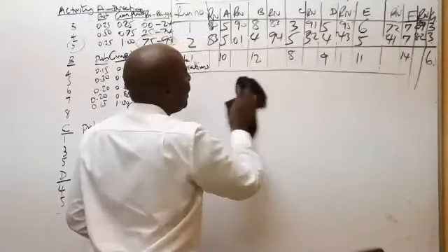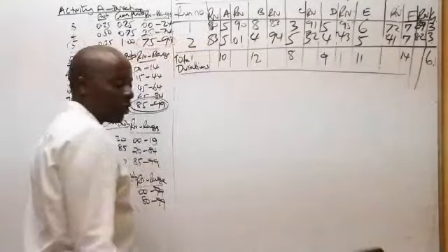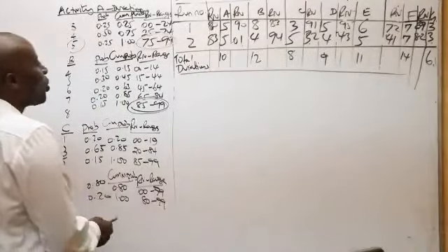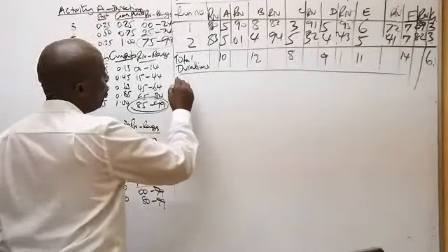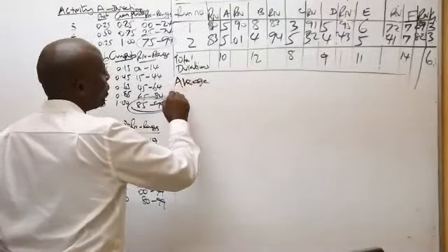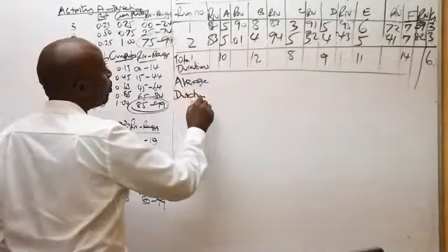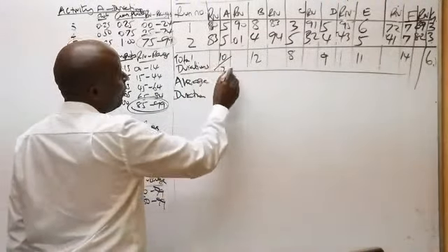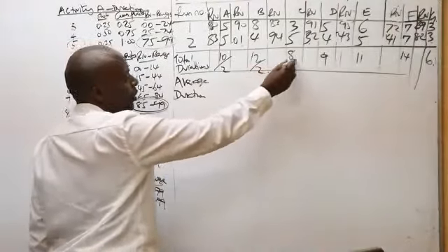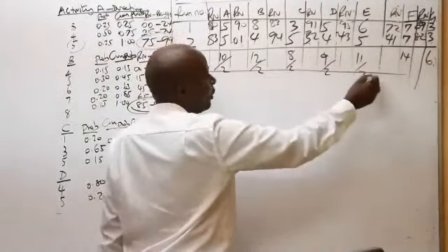At the end of the day, you want the averages. You want the average duration. So come and give me here another row for average duration. Take this and divide by 2 runs. All this you divide by 2. All this you divide by 2. All of them you divide by 2.